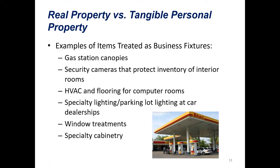Here's a list of examples of items commonly treated as business fixtures. Remember, the primary test is whether it primarily benefits the business conducted on the premises. These things have been determined to primarily benefit the business rather than the realty: gas station canopies, security cameras that protect inventory of interior rooms, HVAC and flooring for computer rooms, special lighting, parking lot lighting at car dealerships, window treatments, and specialty cabinetry.